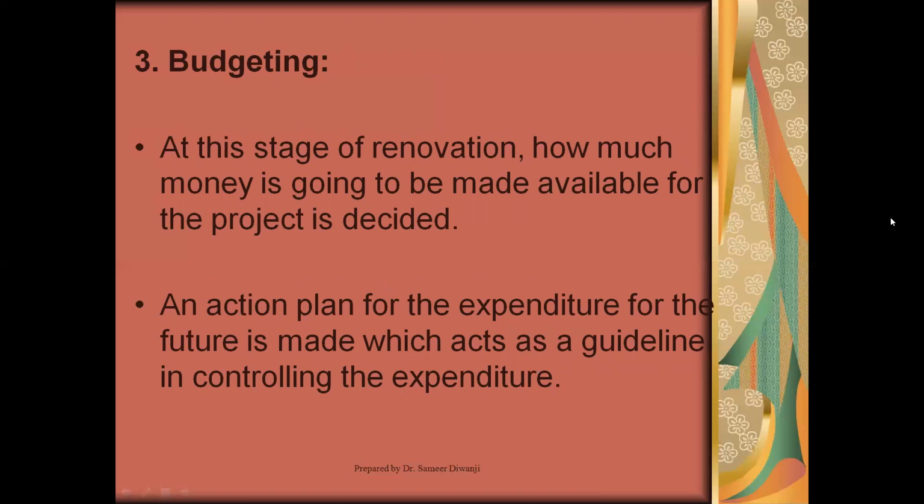Whatever the budget allocation is, or a special allocation over and above your annual budget, this has to be very clear. Also remember, the costs always have a tendency to go up by 10% here and there. So make sure you plan really well, budget really tight, and implement it with as much discipline as possible.